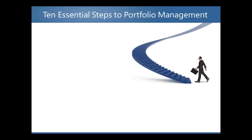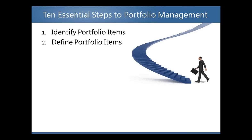Step one: identify portfolio items. Determine what project or work you would like to implement. This is not an individual effort — most likely work and projects will be identified by many in the organization. Step two: define portfolio items. For this pre-selection round, you'll need to define enough information to establish value of the given initiative, but not too much detail. Description, business case, benefits, strategic alignment, and risk tolerance are all factors to be considered.